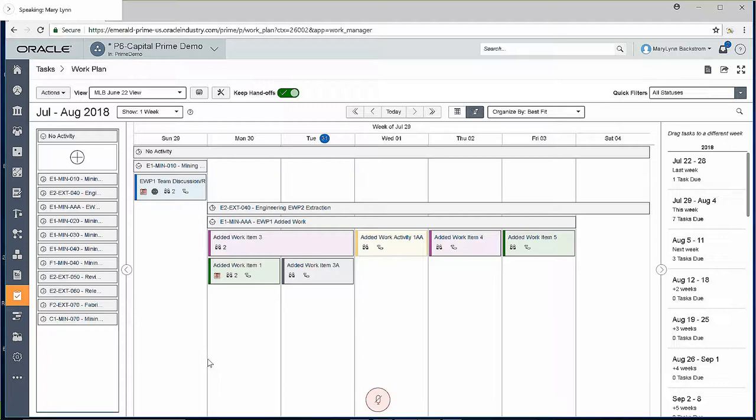Poll planning basically is working backwards. You're working from the end to get to the start point. And it also allows stakeholders to identify the potential roadblocks that could appear down the road.